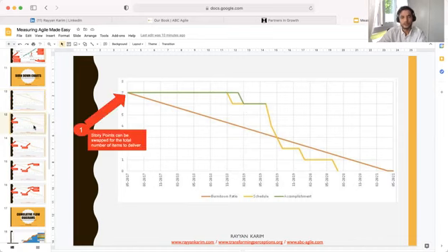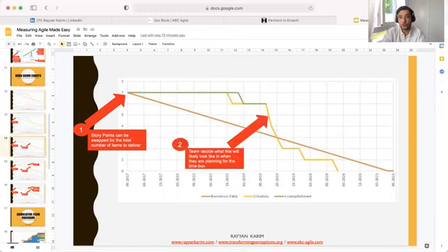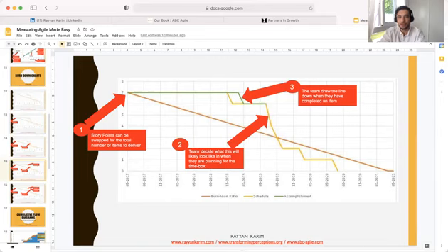Well, on the left-hand column, at the moment, it looks like they've got a number of stories. You can swap that for story points. Again, if you really wanted to, you could swap that for hours of effort if you really needed to for your environment. We know that the yellow line is what they plan for in their sprint planning. We've discussed that. And we know that the green line is what they're doing every day when they're coming in to their stand-ups. They're marking down, this is what we've got done, and therefore this is where we are in accordance to our plan.